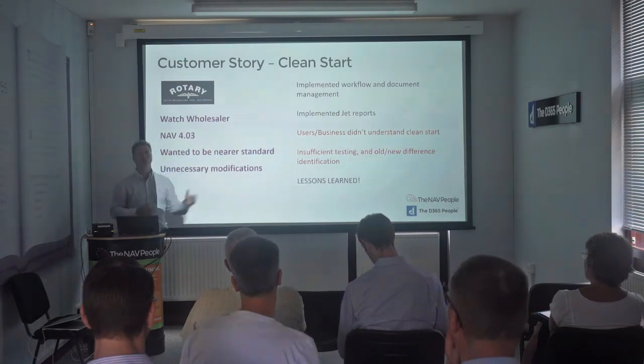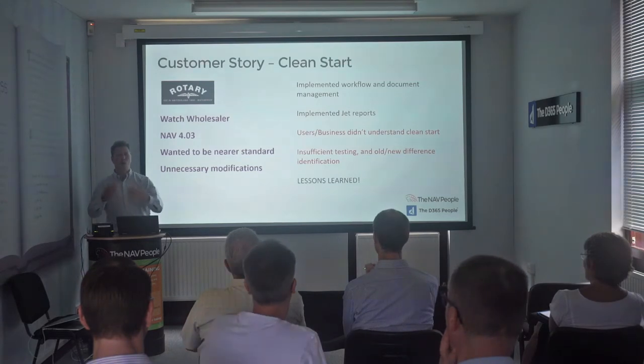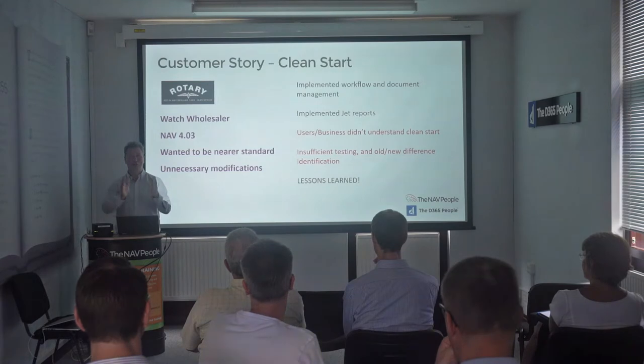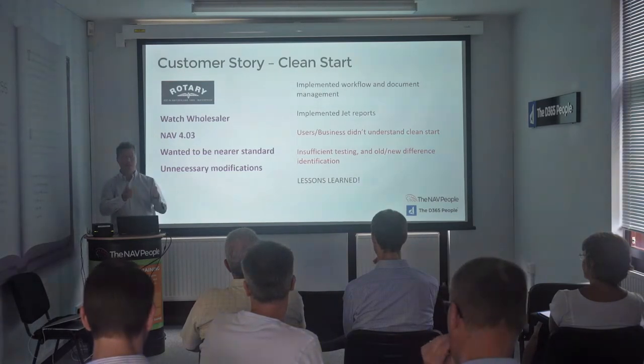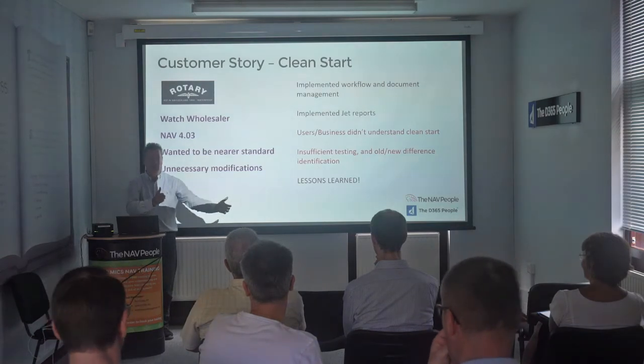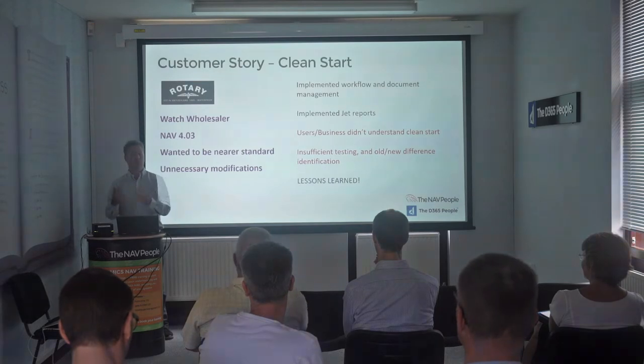But they didn't tell the users it was a clean start. They kept using the word upgrade internally. So although all the way through the process, users had never seen certain functionality on the UAT system, they still somehow believed that the next week this functionality was going to be there. Because they thought it was an upgrade, they had an expectation that everything was going to be there.